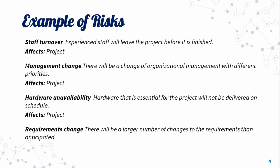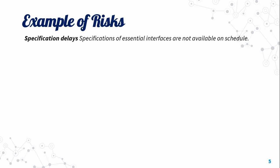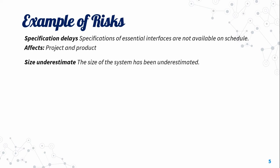Requirements change — there will be a larger number of changes to the requirements than anticipated. We have given the requirements to the customer; however, the requirements will change, which affects the product and introduces product risk. Specification delays — specifications of essential interfaces are not available on schedule.